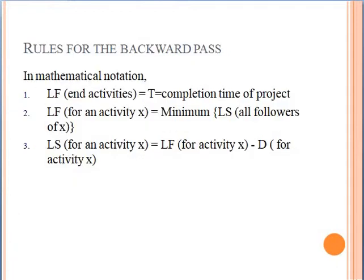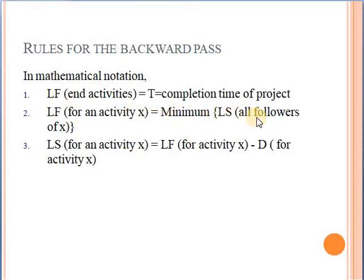We have some rules for the backward pass. Our starting point will be the end activity — the completion time of the project that we got from the forward pass calculations — unless we have a constraint, such as you must deliver the project at week 30. If you have no constraint in the contract, then you begin with T, the completion time from the forward pass. The latest finish of any activity will be the minimum of the latest start of all its followers. The latest start of any activity is the latest finish minus the duration of the activity.